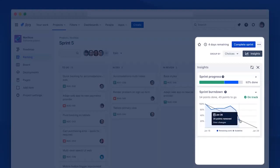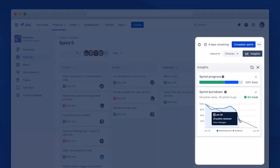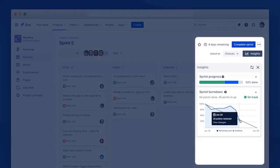So it gives you the opportunity to look at team priorities together and see if some of the issues can be removed so the team can focus on what matters the most for the sprint. So you decide to drop a big chunk of work and just chose the most important one in the sprint to be completed. And you can see on this chart that now the team is back on track. Yes, it's unfortunate what's happened in the sprint, but what matters is that the team was closely watching the progress and the scope creep and responding quickly to changes.